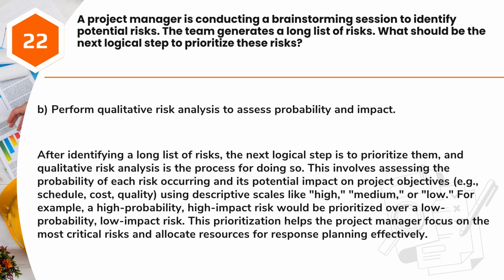using descriptive scales like high, medium, or low. For example, a high probability, high impact risk would be prioritized over a low probability, low impact risk. This prioritization helps the project manager focus on the most critical risks and allocate resources for response planning effectively.